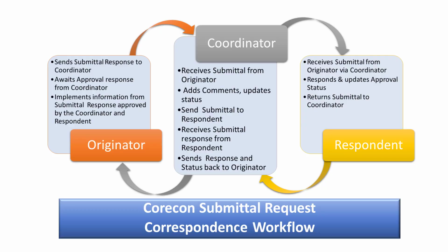Next, the coordinator receives a notice that the originator has replied. The coordinator can go into the submittal in their Corecon browser solution and confirm the information that was requested did arrive. Also, if more information were needed at this point, the coordinator may send back a follow-up to the originator for more information. Let's assume for a moment that the information was submitted as expected. The coordinator now is sending that information to the respondents, in this case 2 respondents, for approval.